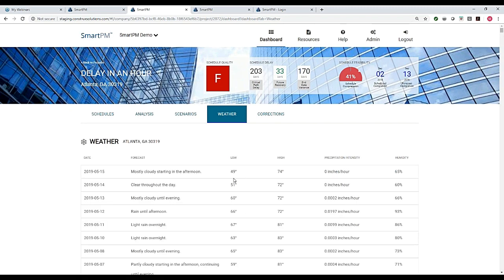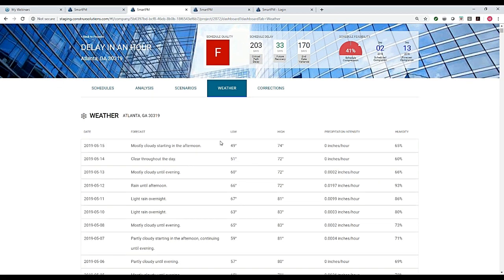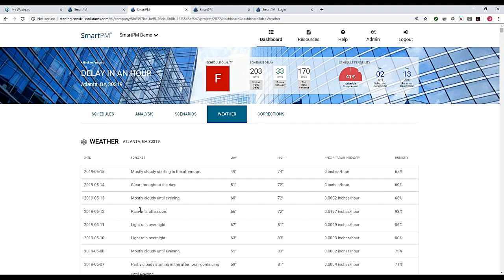Based on the location that we pulled, it's going to give us weather for every single day of the job. It's going to tell us how much rain, what the temperatures were. This is our phase 1 weather analyzer. The next one that's coming out probably in about a month is going to take your 10 and 30-year averages, tell you by month how many expected rain days you should have built into your schedule, and then monitor based on whatever conditions that you put in there, how much rain or what temperature it is, how many actually exceeded or were less than what was planned. But yeah, right now we merely pull it in from NOAA. The next phase is to start running calculations consistent on how we typically do analyze weather.